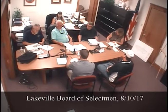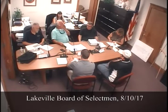The important thing after town meeting, the certification of titles have to be recorded. So the developer's attorney is Attorney Jacoby. I don't know that he's ever done that. It's 120 days that they have from the date that the town accepts the roads to get those certifications recorded. That didn't happen at Woodland Ridge, if you remember. Yep. We had to go back and do the whole thing all over again.